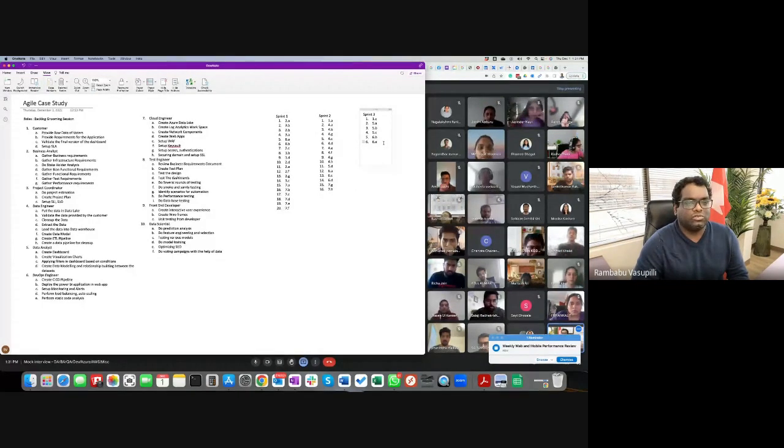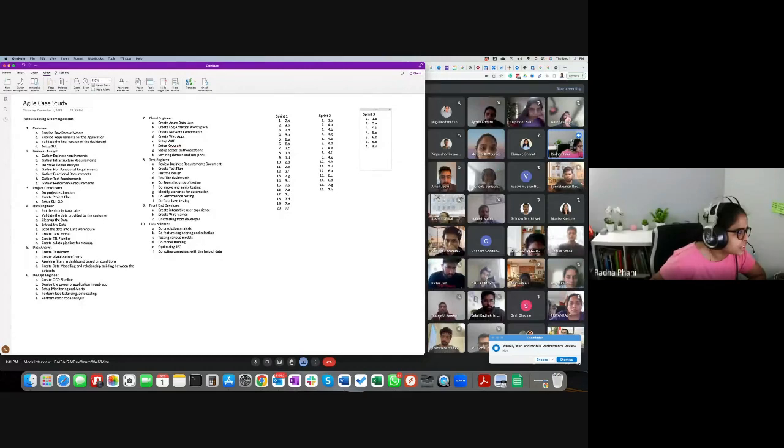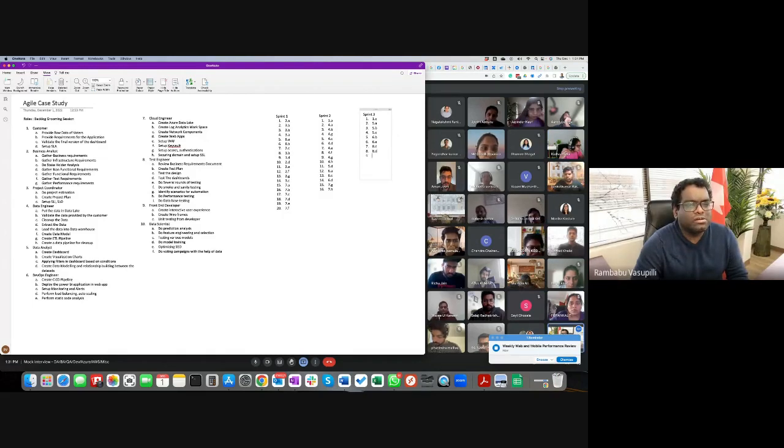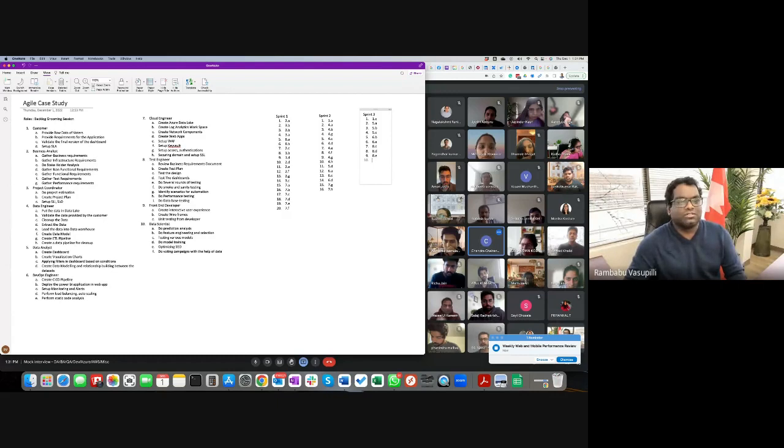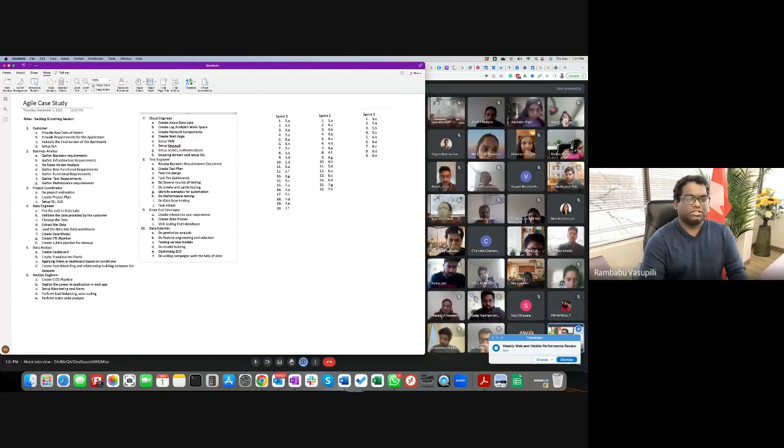Okay, so this is 8D. 8E, several rounds of testing, will also be in sprint 3, sir. 8F, also in sprint 3, sir. Do you want to test the infrastructure? So you have to capture one requirement, right? Test infrastructure: since the infrastructure is created in sprint 1, you will test it in sprint 2.